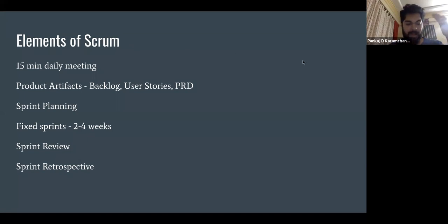There's a backlog. Backlog would be the different ideas that you have collected of what you want to do in your product. For example, if I was Swiggy in the early stages, my backlog would have had, I want to add live tracking for riders. I want to add a tipping system for riders. I want to add a feedback rating system only for the riders and keep the restaurant rating separate. I want to add a feature where I can add UPI as a payment, and so on and so on. Like, this backlog could be endless.